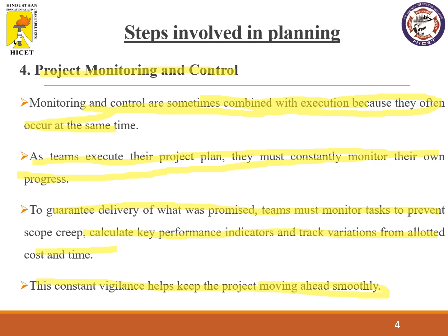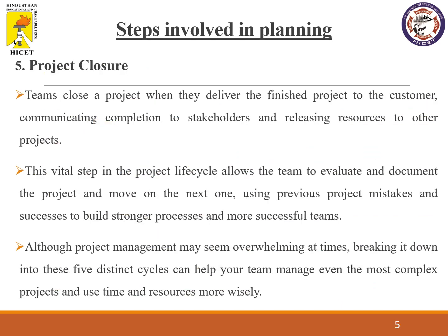And the last part in our planning will be project closure. Here, we deliver the finished project to the customer, communicate the completion of the project to the stakeholders, and release the resources to other projects. This means the project is closed. That is, every work related to the particular project is completed, and we are not going to do any further work. If you have successfully completed the project, then the team will be able to evaluate and document the project and move on to the next one.